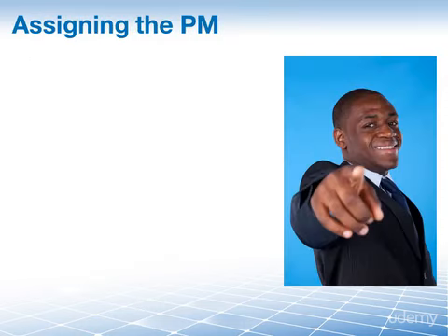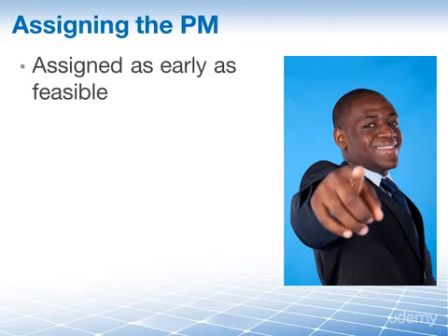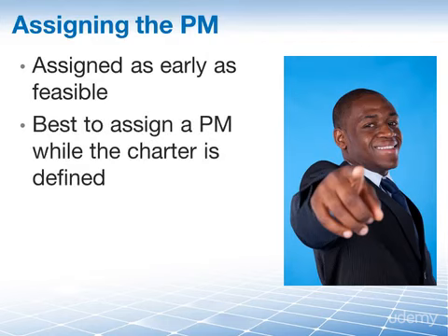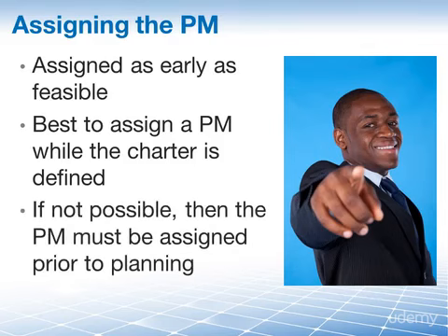And when it comes to assigning the project manager, we also follow specific guidelines. The project manager has to be assigned as early as feasible. It is best to assign a project manager while the charter is defined, so that she or he can take part in the project early on. If that is not possible, then the project manager must be assigned prior to the start of the planning phase. And let me repeat that. The project manager must be assigned prior to the start of the planning phase.